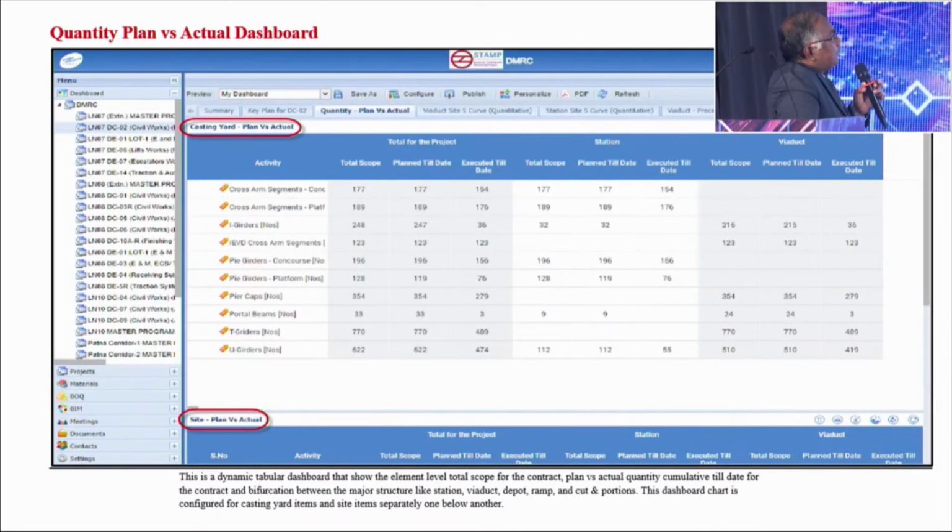You see the overall project, for Delhi Metro, it is basically a metro environment. So most of the things are planned as precast elements, which are cast at the casting yard. Even for most of the stations, we use only the pile cap and pier at the site, even including pier caps and U-girders for the viaduct, as well as in the station.